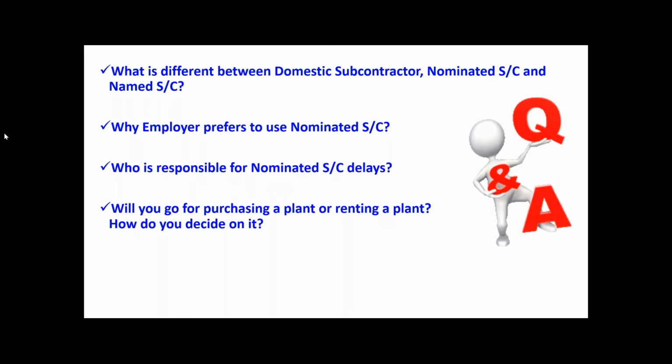No need to even procure or rent it. Or okay, we don't have that plant. We are going to buy or rent. Now we have to decide how long the project is going to run. We have to calculate both ways. Renting cost, all-in rate for rent, all-in rate for procurement. We have to do both calculations. Then whichever is profitable, you have to choose it. So that factor depends on the time, right? Even you have to think about the initial purchase cost, whether we can accommodate that much money or not. So these are the factors.